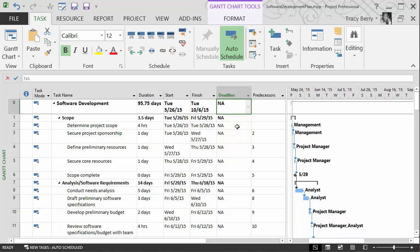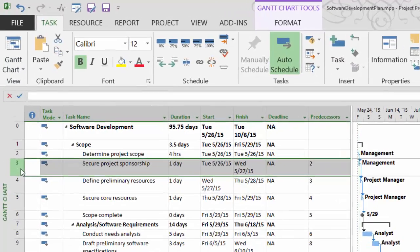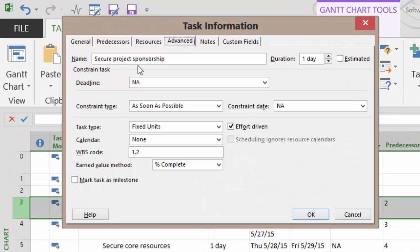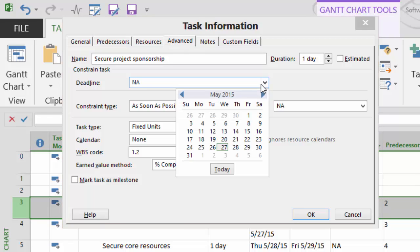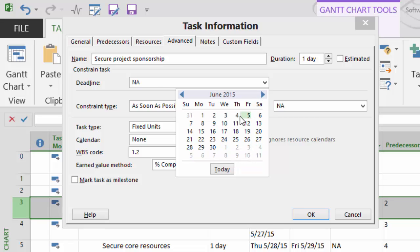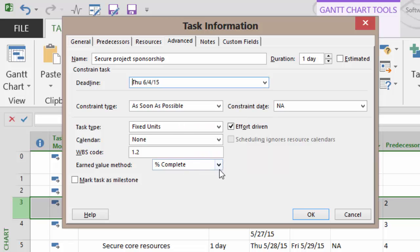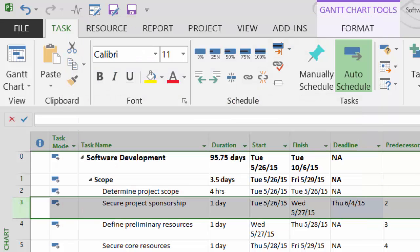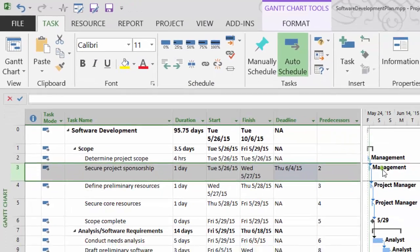If you did have deadlines set, by the way, another way we can traditionally do that is to double-click upon a task. On the advanced tab we have an area in the constraint to show a deadline. So this is one place I could post a deadline, and I can say that I would prefer that this particular item be done by here, and then click OK and it will put that deadline in place.